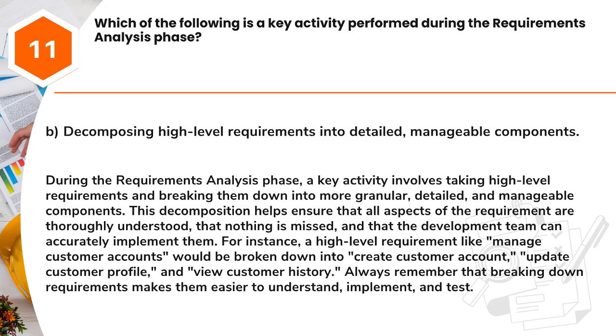For instance, a high-level requirement like manage customer accounts would be broken down into create customer account, update customer profile, and view customer history. Always remember that breaking down requirements makes them easier to understand, implement, and test.